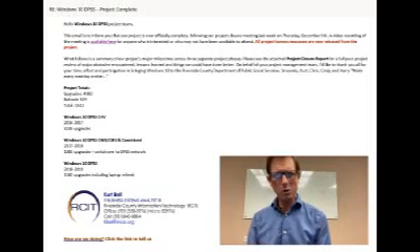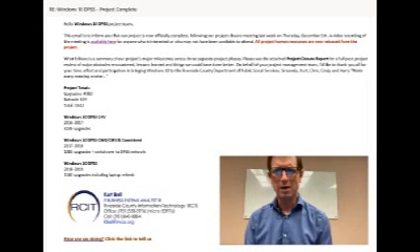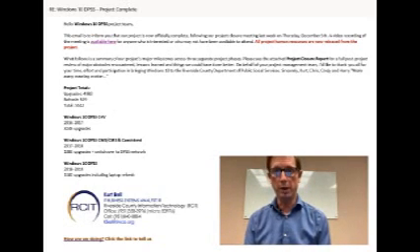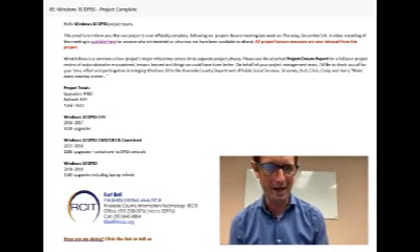People wonder, am I still part of the DPSS Windows 10 team? People call them up and ask them for questions, and they're thinking, am I still part of this? Well, actually, no, you're no longer part of it. So if issues come up, issues need to be channeled to the appropriate help desk and then escalated up for support. In fact, if I was to do this email again, I would probably add a sentence to the end there saying, any subsequent support request should be routed to the RCIT help desk to be handled.